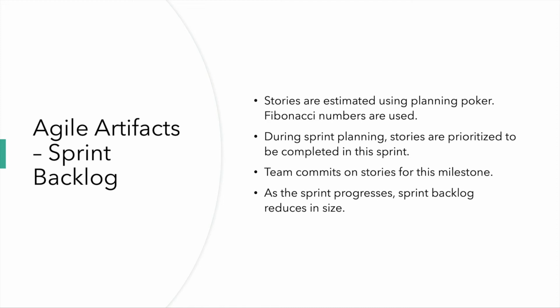It's important to ensure that before committing, you understand that a given milestone or sprint is, say, 2 weeks or 4 weeks, and if the story points do not fit into the sprint timeline, then you might have to reconsider and remove some of them so that the stories will fit in that particular milestone.